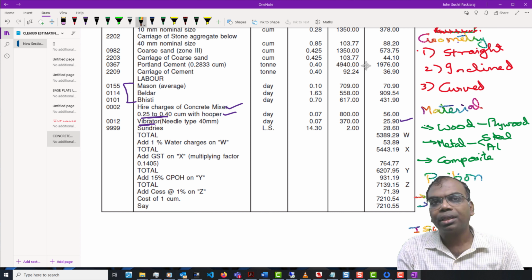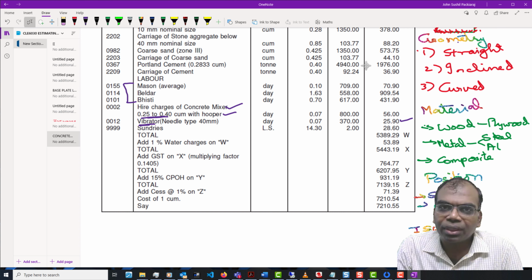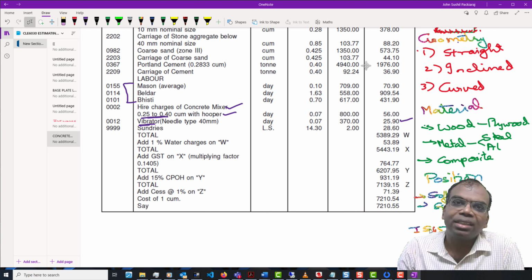But please remember, I am deliberately not quoting IS 456 in this meeting, because IS 456 is only for ordinary Portland cement. Suppose you add additives. If you are adding an accelerator, or doing something like steam curing, it means the concrete is gaining strength at a much earlier stage and you can strike the formwork early. In other words, the props which I keep could be reused faster because I adopted steam curing.